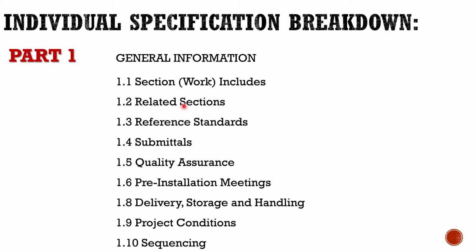So that's Part 1, the sequencing of the construction and existing project conditions. This is important because there's certain sequencing and project conditions that have to occur before this product or construction action can happen. It's also a way to warn, okay, I'm going to be traveling down a 20-foot by 20-foot diameter hole 100 feet deep.